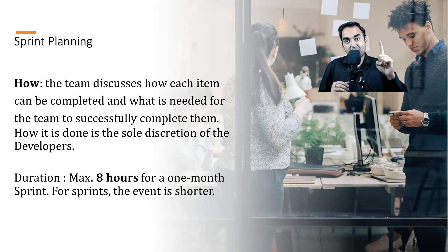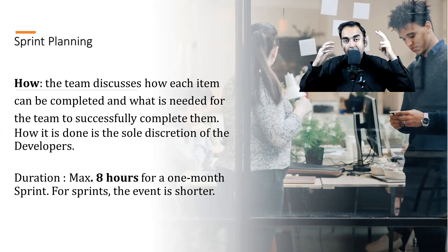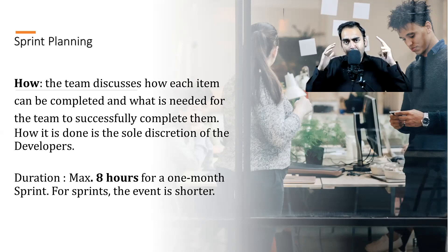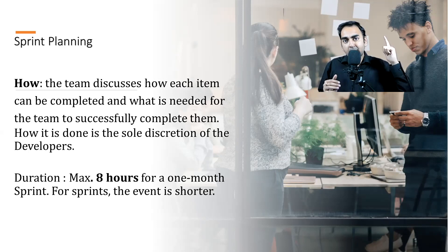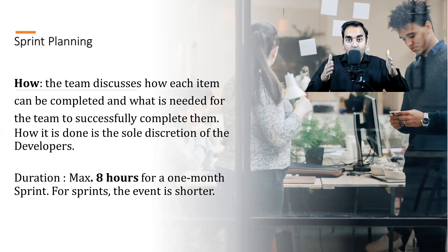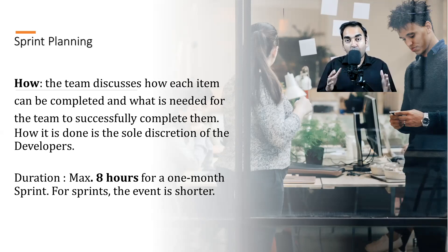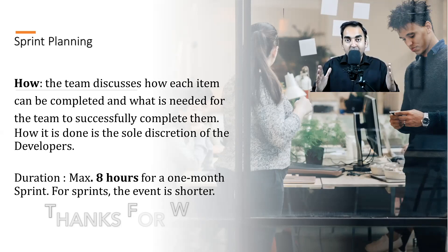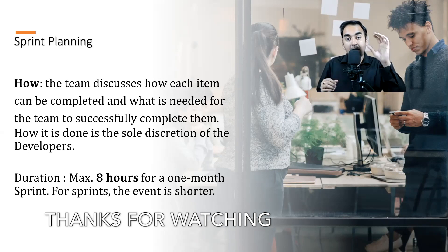In short, the team needs to answer three questions: why something needs to be done — answered by the product owner; what needs to be done — determined by the team based on past performance, team capacity, and definition of done; and how it needs to be done — which is the sole discretion of the developers. The timebox is eight hours for a one-month sprint and shorter for shorter sprint cycles.